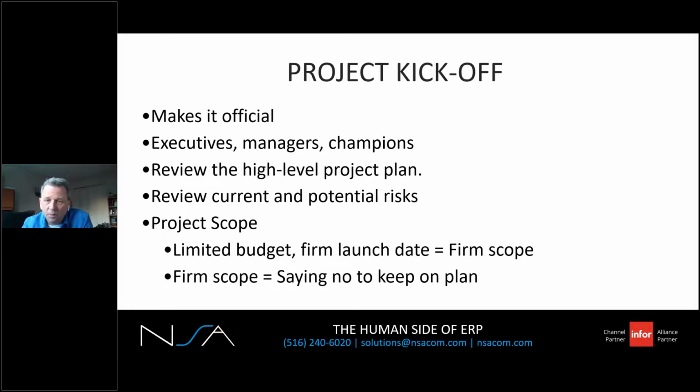So in this meeting, prepare to review the high-level project plan in the kickoff meeting itself. The major tasks, the milestones, the deliverables. Review and sensitize executives to the current and potential risks. Through this kickoff, the leadership learns what's involved and still declares it a priority.